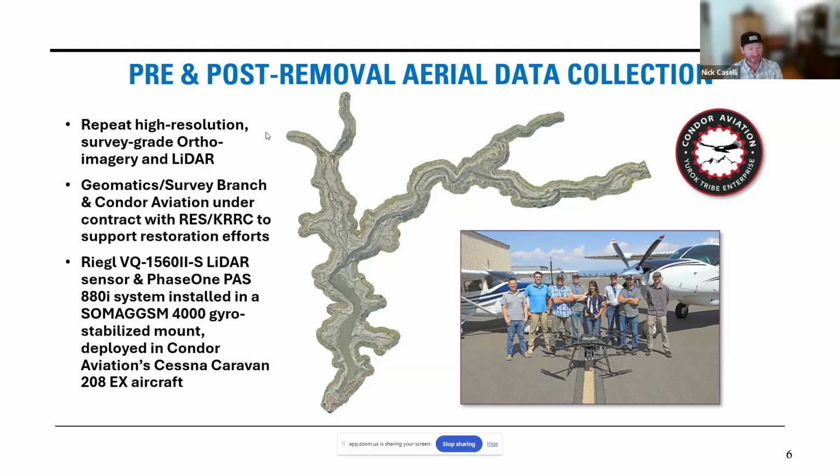And then prior to the flights, there's a lot of groundwork that needs to happen as well, aside from just the flight planning. To get our survey grade accuracy, we need to establish ground control throughout our area of interest. And so that involves checking known monuments, setting up survey targets. Any individual flight could take a week or two of ground survey crews setting control before the flight can happen.